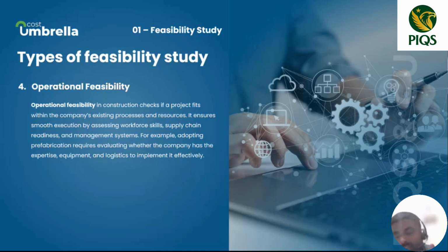Assume you have enough funding and enough technical capability. But if you invest your time and money in this new project, you may lose the existing projects. So now you have to check whether leaving the existing one and going for the new one is operationally feasible or not. This type of analysis is known as operational feasibility analysis.